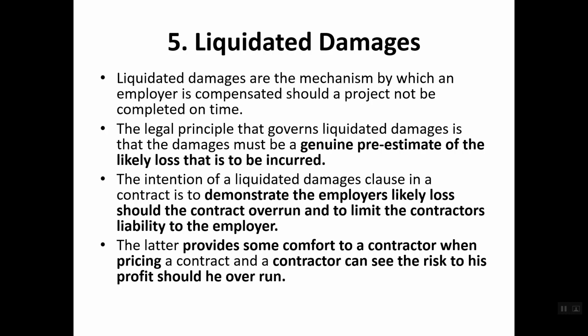So something like, if you are going to rent that particular building, because of that delay, you will be losing 1 or 2 months of rental from that building that you were supposed to earn. And sometimes if it is a hotel project, you are supposed to open it in the season, but you couldn't open it because that particular contractor delayed your project. So you will be losing that particular rental income for the hotel, or some kind of maximum profit you will not be having because of that delay.